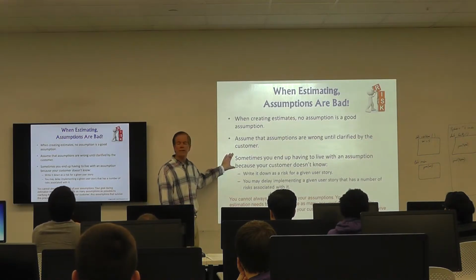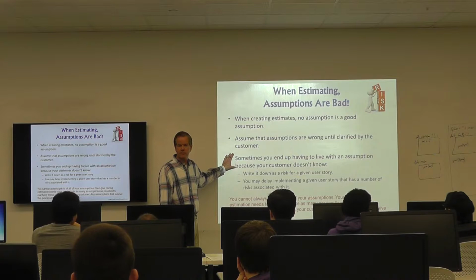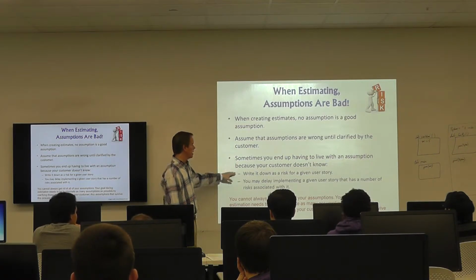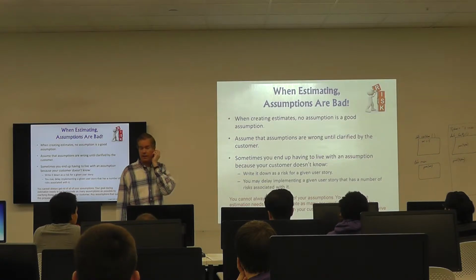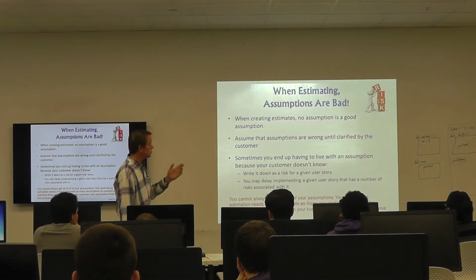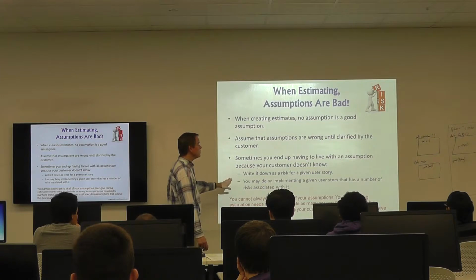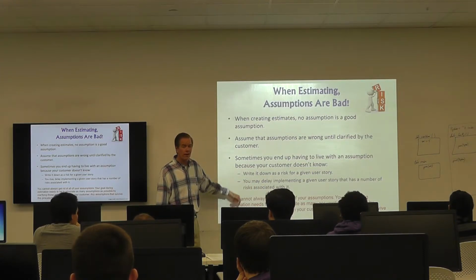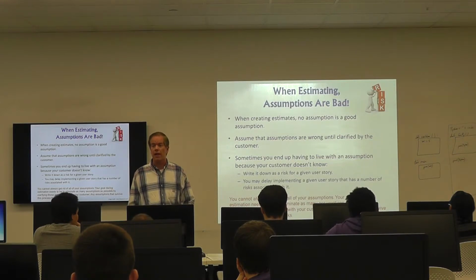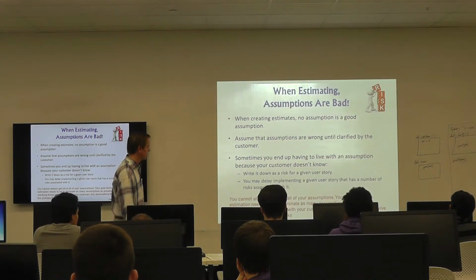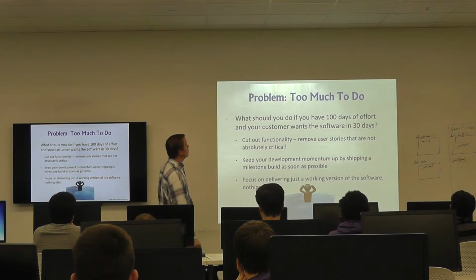Now, sometimes you do have to end up living with an assumption. Sorry, that's just the way life is, okay? But it's because your customer doesn't know how you can resolve that assumption. When that happens, what you need to do is write it down. You also might want to delay that user story for a little while, because maybe your customer is going to get more information as you go along in the software development project, and they'll turn that assumption into something that's for real.